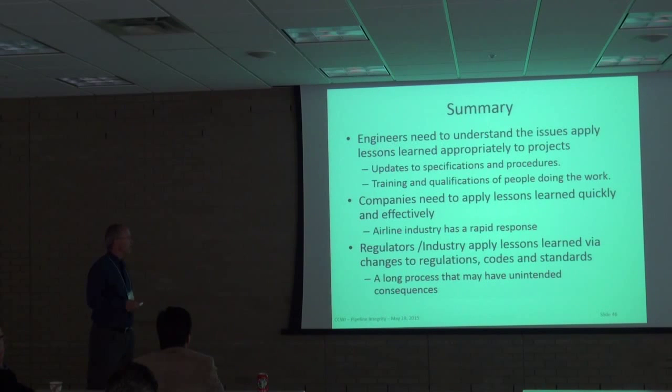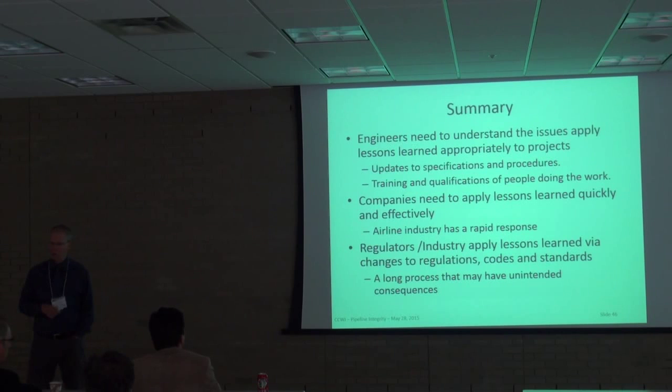As engineers, you need to understand the issues that apply and apply lessons learned appropriately to projects. Those are often applied through specifications and procedures. When I've worked for major oil and gas companies, every time we learn a new lesson, we change our specs to try and prevent those things from occurring. We also try to train and qualify people doing the work. A lot of times mistakes happen because people don't realize what they're doing, so some of those quality problems go back to training and competence.